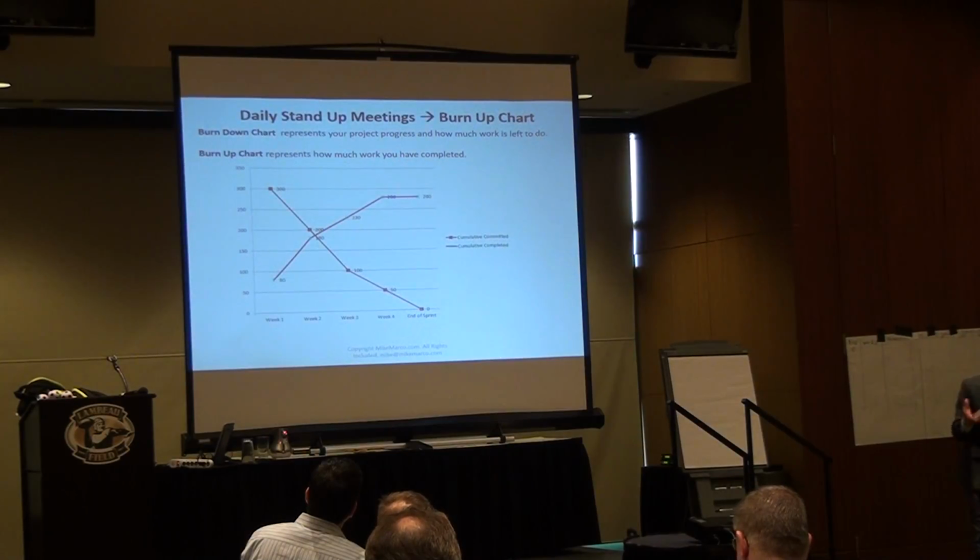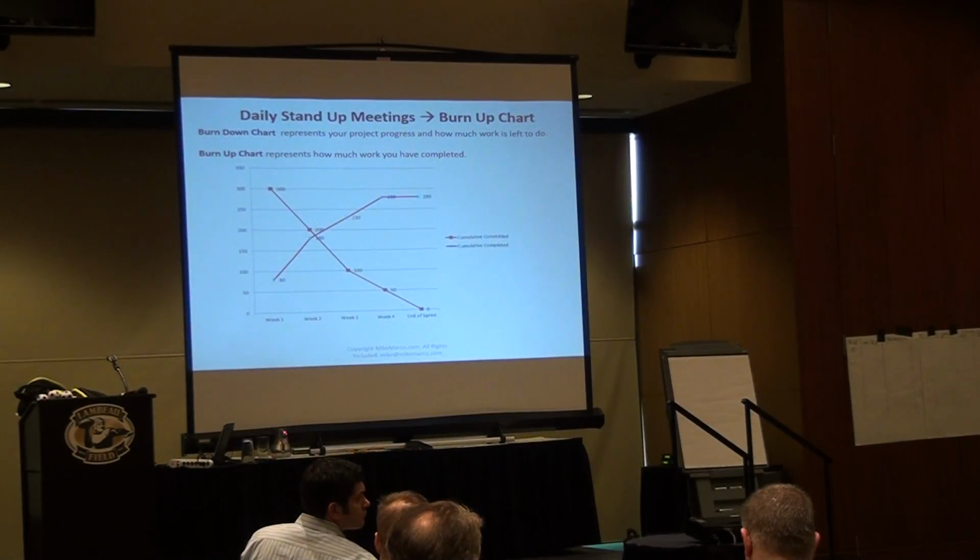So what are the 3 things that I ask my Agile team or Scrum team? Anybody? Go ahead. What did you do since last meeting? What are you going to do until next meeting? And do you have any blockers in your way? Or risks. Very good. So, what did you do yesterday? Any risk? What are you going to do today? Those things can happen on a daily or bi-weekly basis, etc.